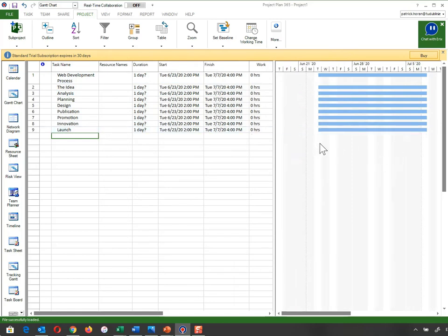Okay, so as well as that, you'll also see that one day now spans over 3 weeks because I'm only working 3 hours a week. Okay, so one day is 8 hours, and that means it'll take me 2 full weeks and 2 hours of the third week. So you'll see that working out, and we'll change these as we move down through them. Okay, so moving in here, what I'm going to start doing is, at the moment, I just put in my main tasks.